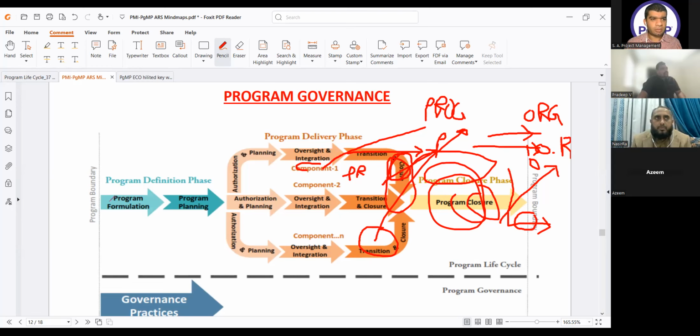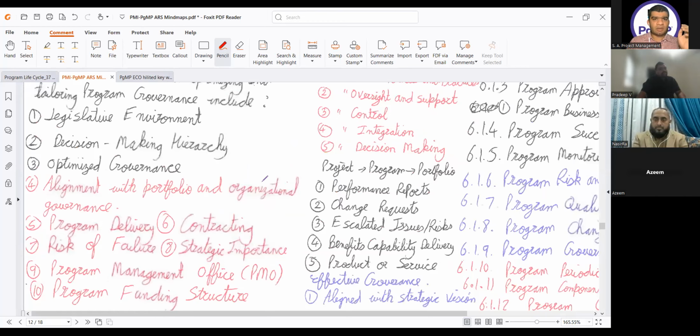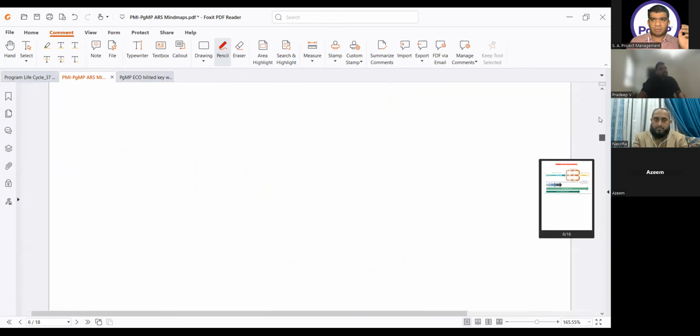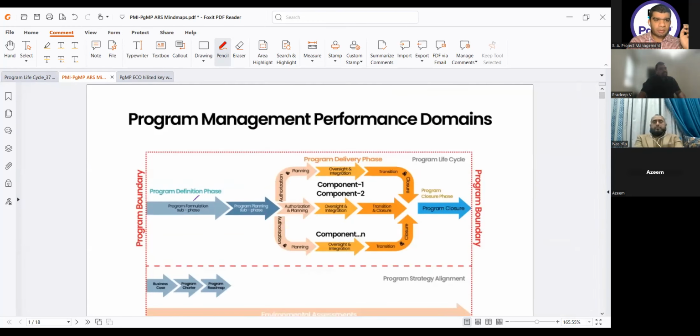Yeah, but I have one question. Before closing, do you have to take approval from the steering committee? Yes. Every step that we discussed that day. Let me go to the main page. Exit criteria, number 1 thing, and whenever you have to change over the phase, you have to make a phase gate review, and phase gate review means approval of the steering committee. We discussed in the first class, and we will discuss in detail in the governance chapter.